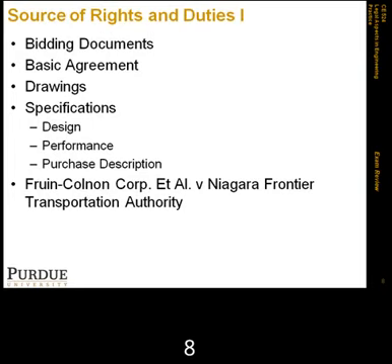This was specifically talking about the water tightness of the tunnel, and it was viewed as a performance specification. However, when the contract was viewed as a whole, it created a design specification rather than a performance specification, because there were detailed specs for the lining, the concreting, and how the fissure grouting was going to be done.